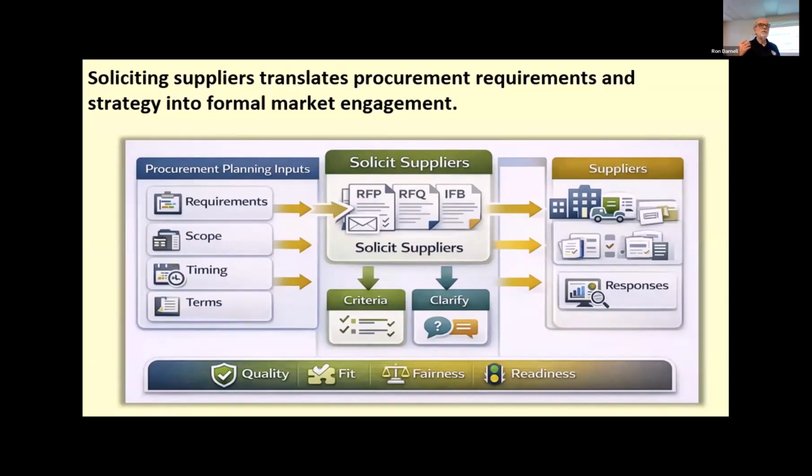The idea is you have to decide as a project team what resources you need in terms of labor resources, mechanical resources, technology resources, all of that. And then you have to decide whether it's better for the project for us to build it ourselves, or do we have internal organizational capability that we can draw from, or do we need to go out on the marketplace and purchase it?